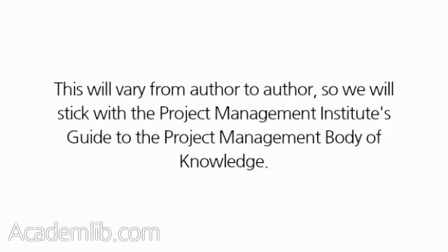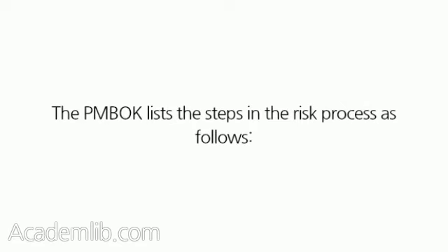Management Body of Knowledge. The PMBOK lists the steps in the risk process as follows: risk identification, risk quantification, risk response, risk control. Tell me more.